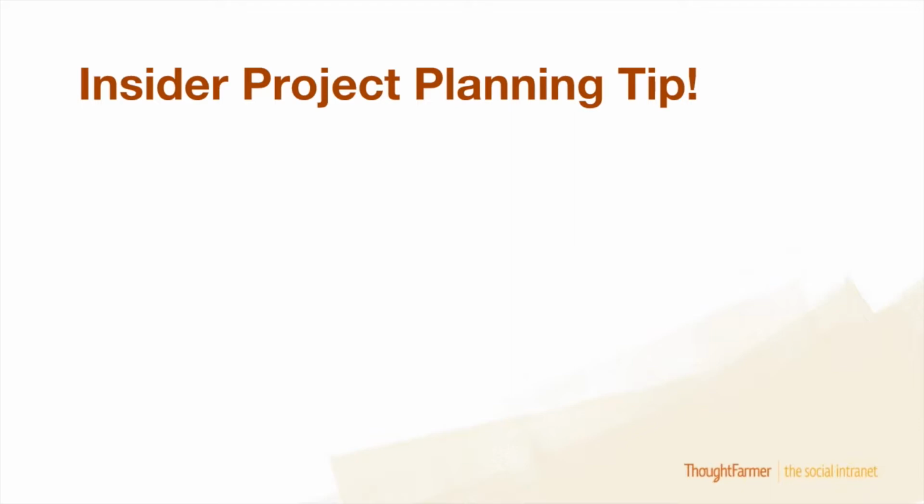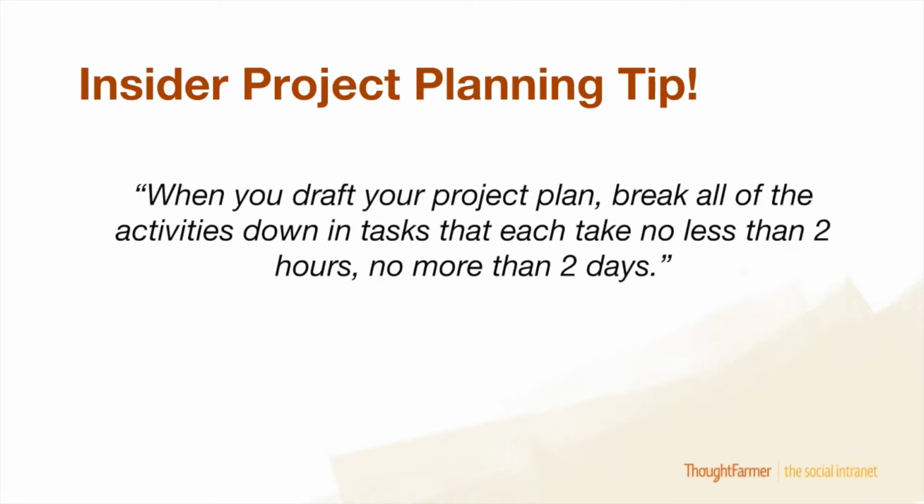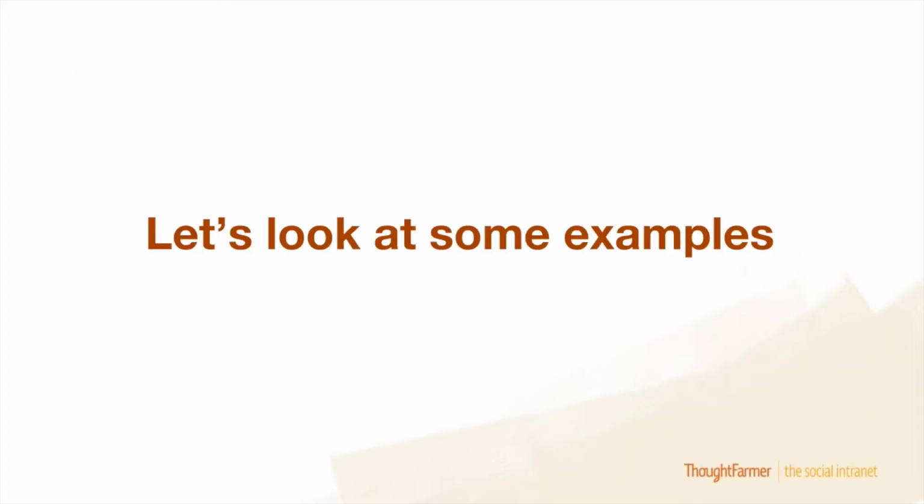Now, insider project planning tip. These are just some words that I want to share. Words of project management wisdom, as spoken by our own Jessica Evans, who runs all of the projects here at project services here at Open Road. And her advice is, when you draft your project plan, break all of the activities down into tasks that each take no less than 2 hours and no more than 2 days. Thank you, Jessica. Those are wise words.